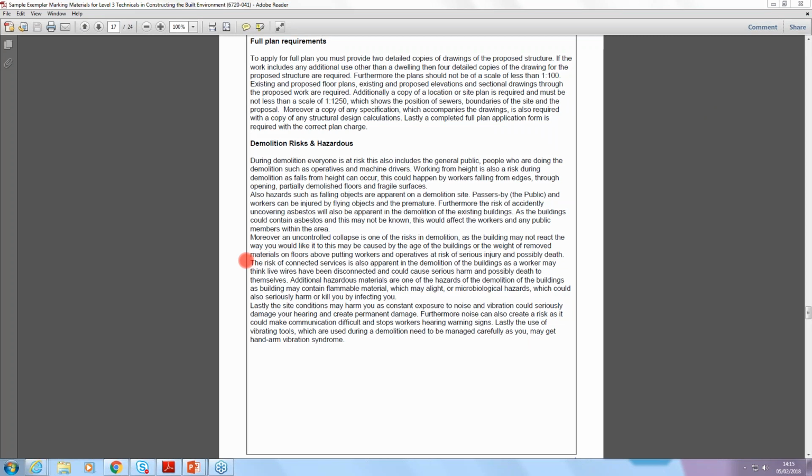Certainly if there's going to be a disruption to work activities and you've got people on site, but you've forgotten to send a request in that's going to take 6 weeks to action, there could be serious implications regarding the length of the project, completion dates, and things like that.